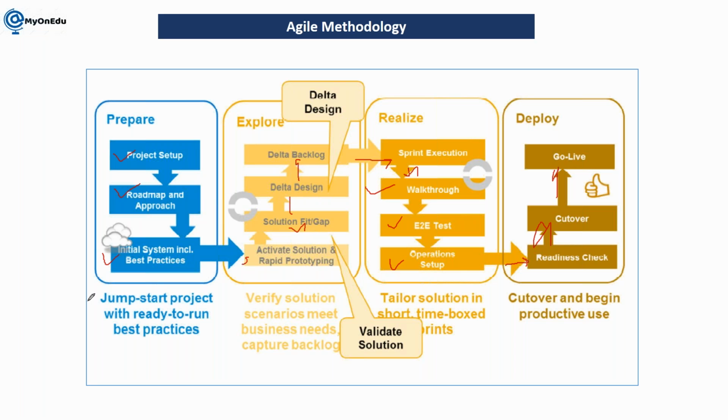So, jump-start the project with ready-to-run best practices. This is part of prepare. Verify that solution scenarios meet business needs and capture the backlog. This is part of explore. In realization, you are building the tailored solution in short time-boxed sprints. And in deploy, you cut over and begin productive use.